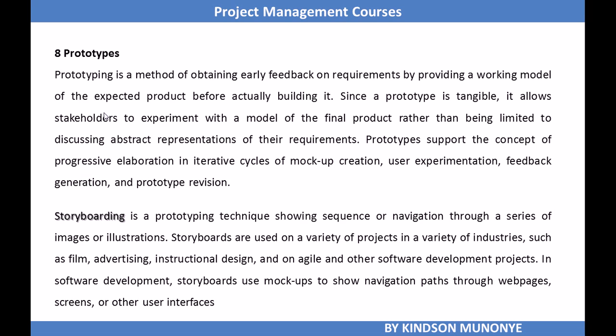So this prototype is building a model. This can also help the stakeholders see what you're about to do, and help them give their own requirements. Storyboarding is a prototyping technique showing sequence of navigation through a series of images or illustrations.